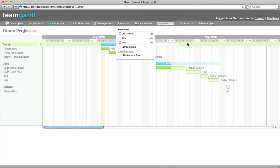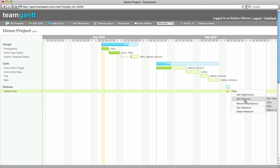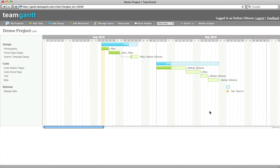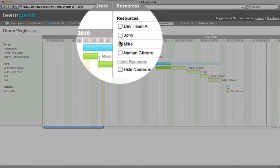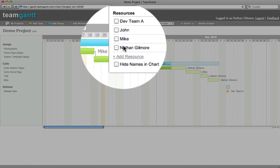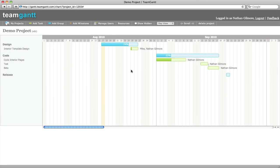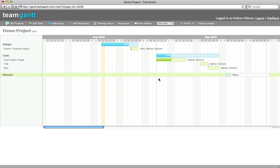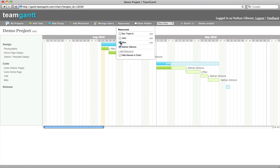Now you can add that resource. The great thing about this is you can now go to the resources menu and view tasks for any particular resource. So if I want to view just my tasks and click on my name, now you can see only the tasks that I'm responsible for. This is very helpful when you have large Gantt charts and you want to be able to simplify it and view just the things that you're responsible for. You can also view tasks that others are responsible for as well.